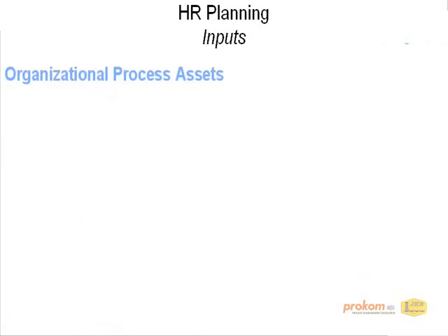Next for review is organizational process assets. As you might recall, organizational process assets contain archives from previous projects. Here, we will utilize templates and checklists from past similar projects, which are located within the archive lessons learned. The purpose is to reduce planning time and also to continue building on what was learned from the previous projects to avoid making similar mistakes and therefore have higher efficiency and success.